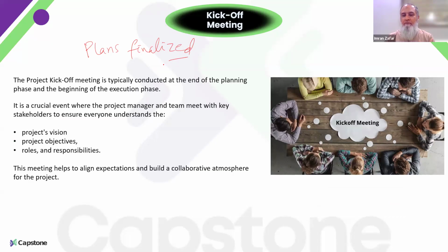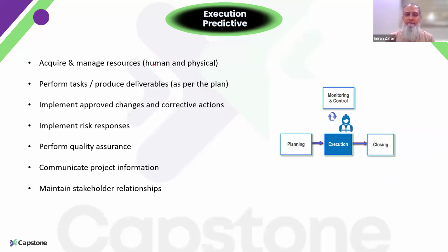And before going into execution, we conduct a kickoff meeting to communicate with all the important stakeholders so that they understand the vision of the project, what we will be delivering, and what role responsibilities there will be in the project, so that everyone is aligned on things. We have the necessary approvals, and then we can start executing the project.